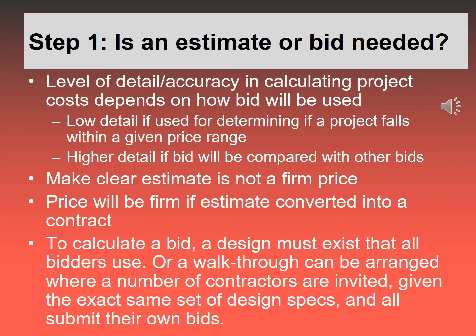They will all be able to be compared and see which one is the one you want to go with. If you work for a public agency like City College, I've had bids put in for a number of projects we've done around campus, mostly in the Lifescape Garden, and we'll do a walkthrough where I invite 6 to 10 different contractors to come. I hand them all the same sheet of all the specs of a project.